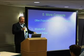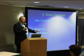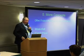Fixed price is where you're going to do something and you're going to get paid a flat rate for doing the entire thing, which can be risky. If you know how to estimate really well and you know how to get things done, you're going to be able to deliver on time, on budget. If you don't, then you will miss your deadlines and possibly can lose money because you're only going to get paid a certain amount of money for doing something.